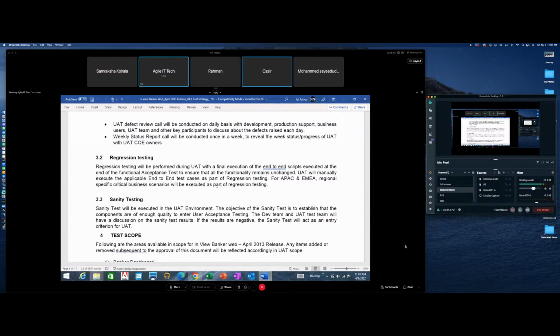So you see how the numbers are adding up, because everything that fails will need to be retested. So you will execute that test case twice, at least. If it still is failing, you might be executing that test case a third time even. You understand? That is why you take the 200 per tester rather than the 250. You got it? Everybody clear?